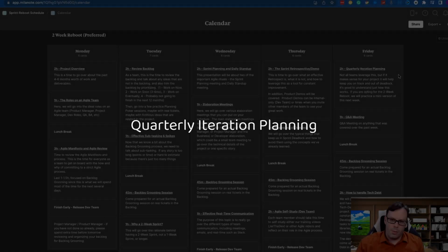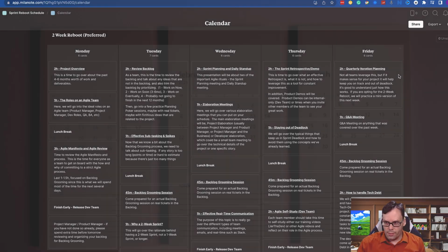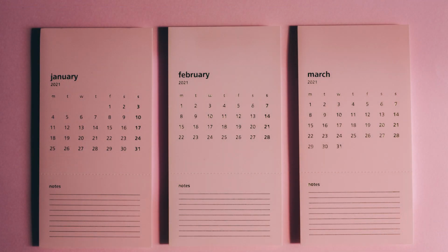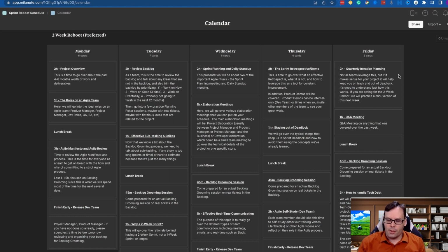Because what it basically means is once you get organized to a point where you can have enough things to look at, you can start having a quarterly meeting where as a team you go over the backlog together with the product owners, the project managers, the other members of the team, and you start planning what exactly you're going to work on for the next 3 months. Doesn't necessarily mean that you estimate everything, because you keep everything very high level and you're not going to go into the details of all of the tasks, but you at least have a very high level overview.